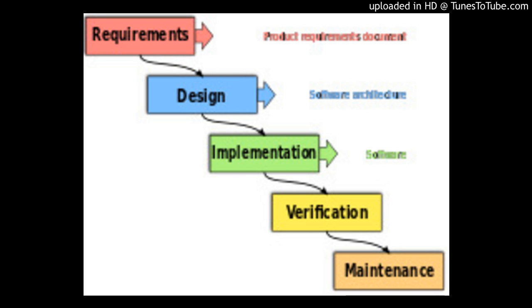A strict waterfall approach discourages revisiting and revising any prior phase once it is complete. This inflexibility in a pure waterfall model has been a source of criticism by supporters of other more flexible models. It has been widely blamed for several large-scale government projects running over budget, over time, and sometimes failing to deliver on requirements due to the big design upfront approach. Except when contractually required, the waterfall model has been largely superseded by more flexible and versatile methodologies developed specifically for software development. See criticism of waterfall model.